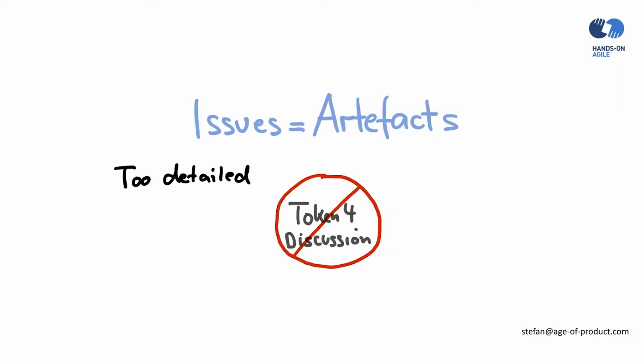Also, if there are no spikes in the whole backlog, I mean, how's that supposed to work? Do you really know everything in advance? I'm generous with spikes. Let's figure out how something works, and maybe it's not going to work at all, and we skip it. Right? But a backlog without any kind of spikes is really causing some suspicion on my side.